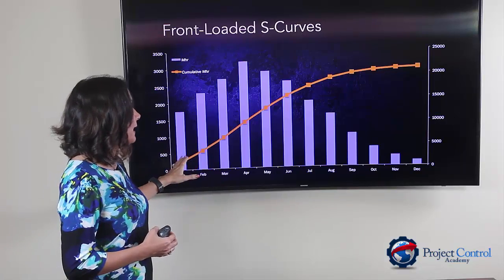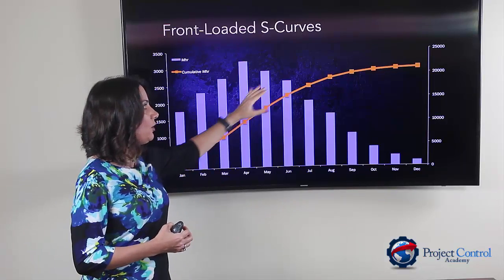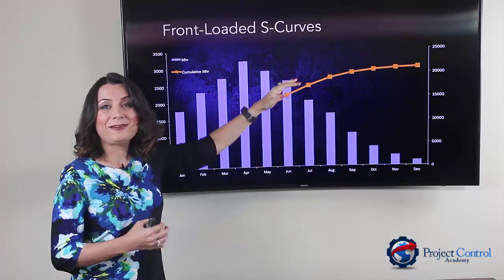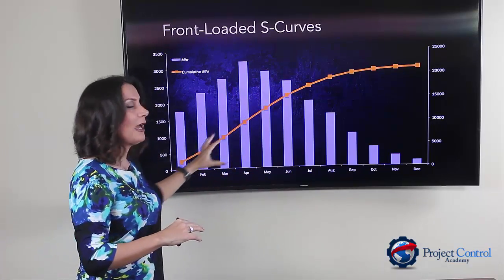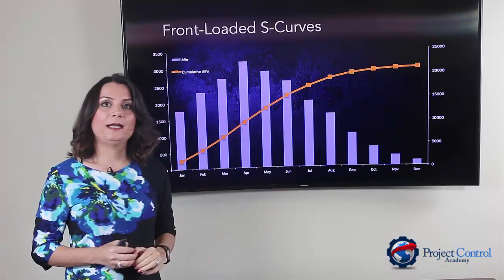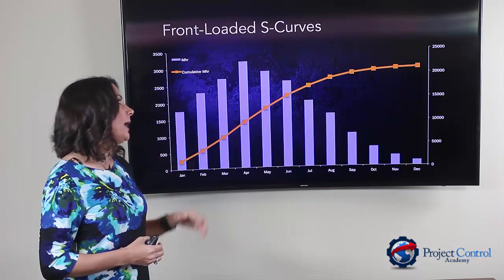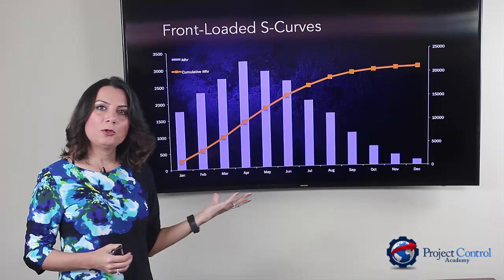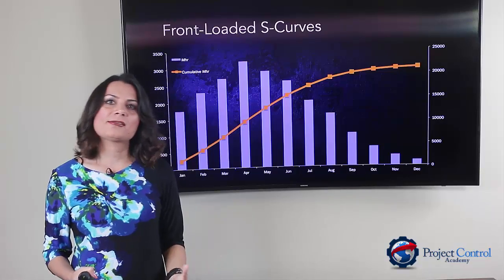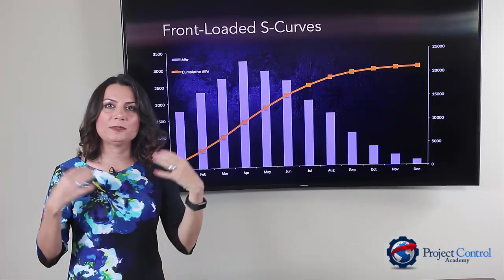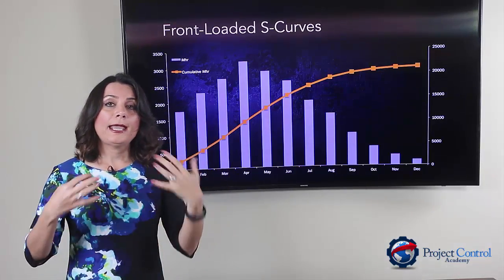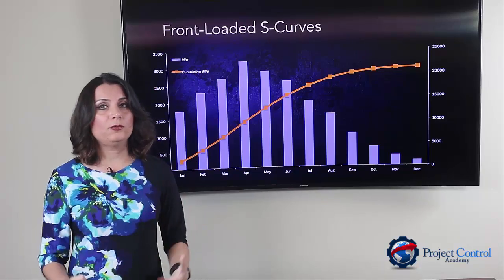You will end up with a curve like a half dome rather than an S-shape, because you have a front-loaded plan in your project. Another example would be repetitive projects — something you have done over and over again, where you don't need much of a learning curve at the beginning.